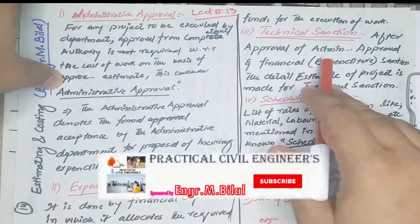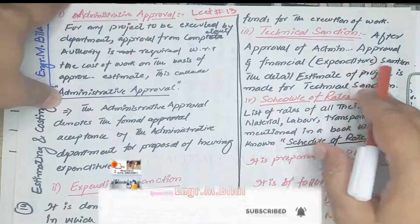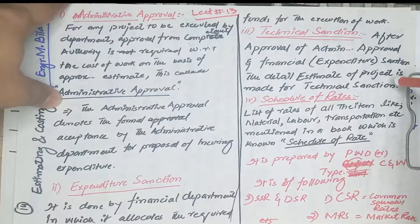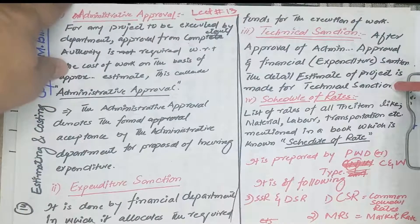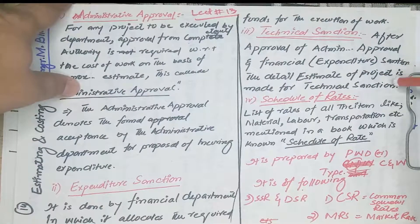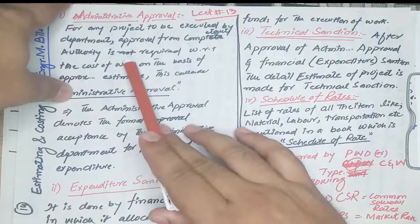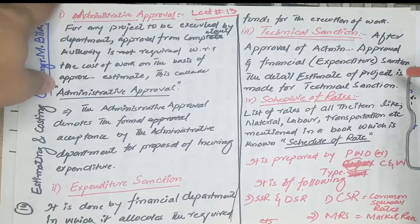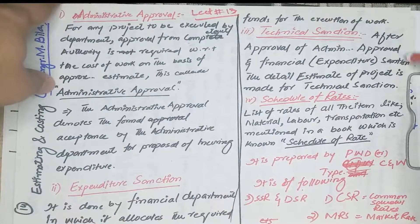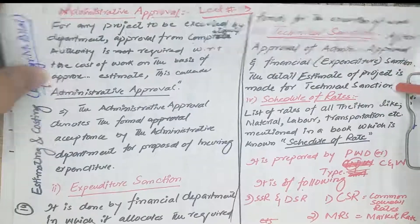The technical sanction comes after approval of Administrative Approval and financial or expenditure sanction. The detailed estimate of the project is made for technical sanction, prepared in the form of a technical sanction. The same estimate may be technically sanctioned by the competent forum. In the technical sanction, there is a limit of up to 10% over the administrative approval. If there are changes in the original estimate, we can increase the estimate by 10% on the total approved administrative cost. This 10% is the allowance for approval of the technical sanction.